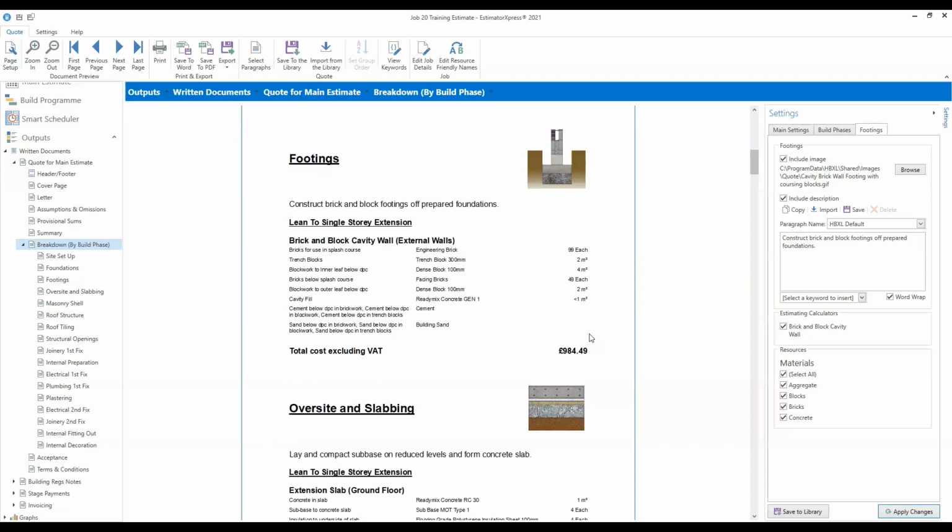The other reason I think builders are sometimes fearful of it is they feel like the client could then go and show it to another builder who could then just quickly throw a quote together based on those quantities. If that's your concern, then you can always produce the quote twice, one with the quantities showing and one with them not. When you're talking through the quote with them, you could show them the version with the quantities and then leave behind one without the quantities, so there isn't that potential risk.